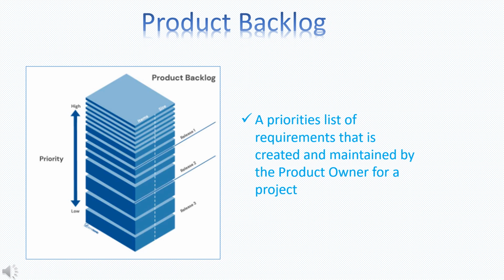The development team contributes to the product owner by identifying non-functional items and risk items that need to be developed during the course of the project, while the product owner determines the items to be included in the product backlog and their values. The development team is responsible for estimating the effort required to complete each one.